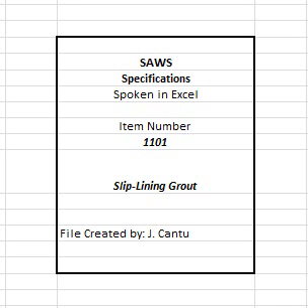If the contract is a stipulated price contract, payment for work in this section is included in the total stipulated price. No direct payment shall be made for incidental cost associated with the quality control testing of the grout, and all costs in connection therewith shall be included in the applicable contract price for the item to which the work pertains. Any retesting costs attributed to substandard results shall be at the contractor's sole expense.